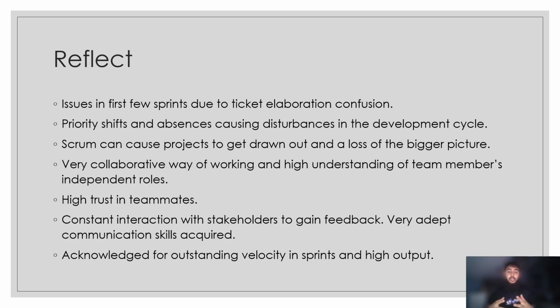So we decided that going forward, what I did was create a reference board, which I would take a ticket from the previous sprints, which was a 3, and say, okay, this is what a 3 is, and then we can compare future tickets and elaboration sessions to that reference board and go, okay, well, if this ticket is a 3 and it was this complex, then we know that because this ticket is this complex, it's also a 3, and so forth, which really helped us in our elaboration sessions going forward.